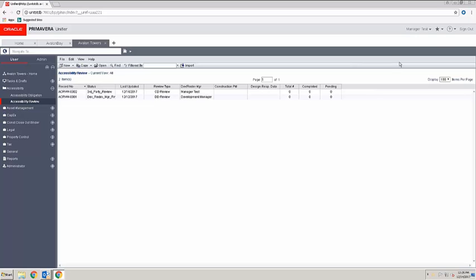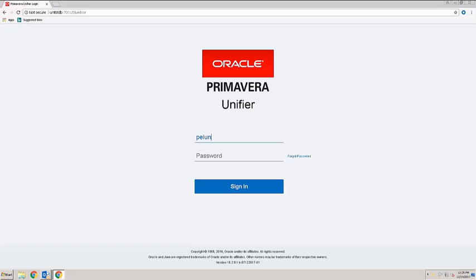All right, so now this record has gone over to our third-party accessibility consultant. And so just to give you a sense, that would be the party that tells us, hey, these are the accessibility items that you need to make sure are considered in the design drawings and in everything that we do. So then it comes to us, and then we send it forward, not to the person that we've contracted specifically for those purposes, but for our design consultants that make sure that everything gets addressed and handled. So it's two different companies.